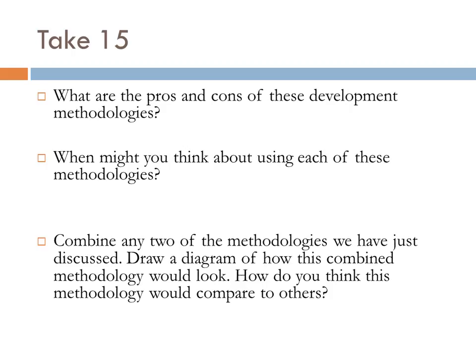The scope at one point in time could be very different from the scope later down the road. So, what exactly are you funding, and on what basis do you create funding for a project? Two, because it's a continuous iterative process where you're doing releases over time. What's the project scope? What's the timeline for the funding? That's difficult to nail down as well.